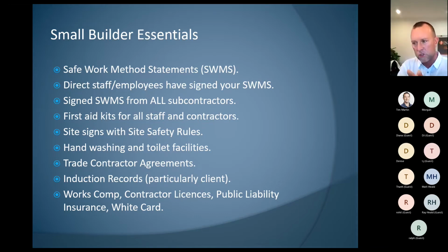Induction records we've touched on, particularly an induction record that you've inducted your client. But if you can also induct some of the high risk trades, your liability will be better managed than without inducting people. In the office, you need to be looking for workers' comp policies that are current, contractors' licenses that are current, public liability policies that are current, and white cards that are current.